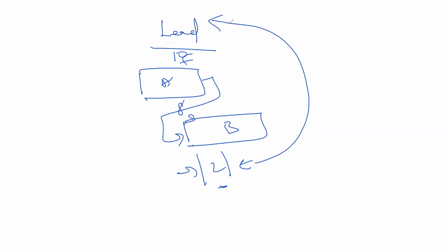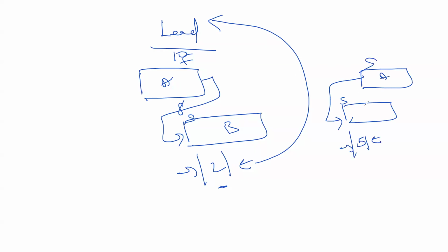So the waiting period between the activities is lag. The acceleration period between the activities is lead. Same like lag, you can have lead with other relationships as well. If I'm saying, okay, 5 days before the start of A, I can start with B, the relationship between A and B is start to start, but there's a lead of 5 days.